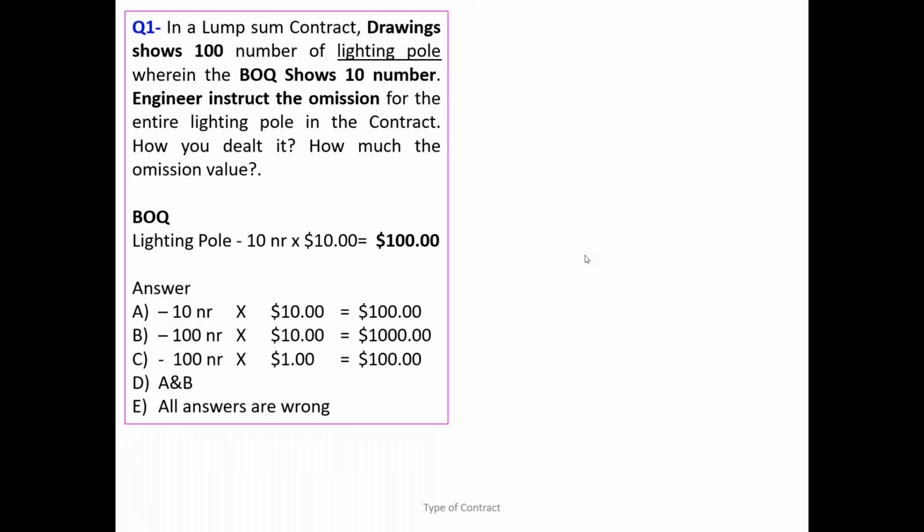Say for example, if you are the contractor and you get one more quantity, you are going to ask $10 as the price, which is wrong. You are getting $9 extra, which is not economical for the client to pay. As a consultant QS, you will not do that. You will see the original scope of work which is defined and the price you agreed, and you are going to do the adjustment.